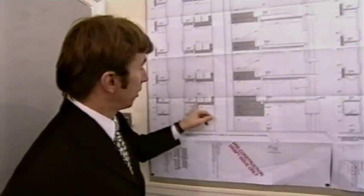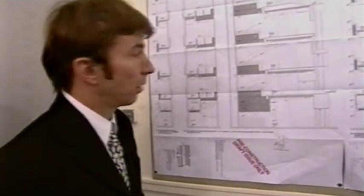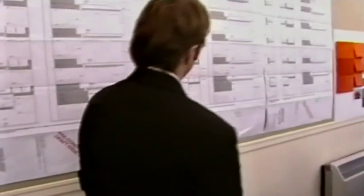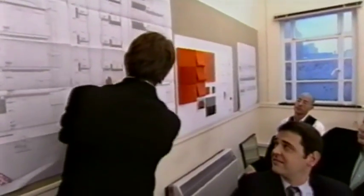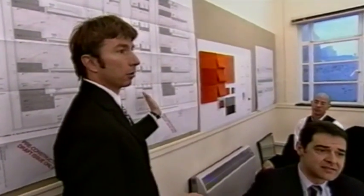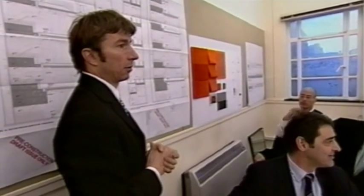Gugger then describes the solution that he favours to avoid the unsightly ledge, but it involves moving the position of several steel columns by 30 centimetres. This could cost £20,000 or £30,000 and delay the steelwork by 2 weeks. Nick Sirota is angry. It's not on. Forget it.